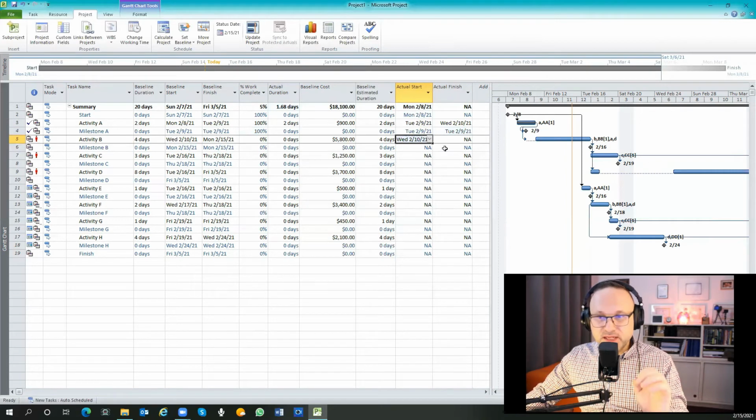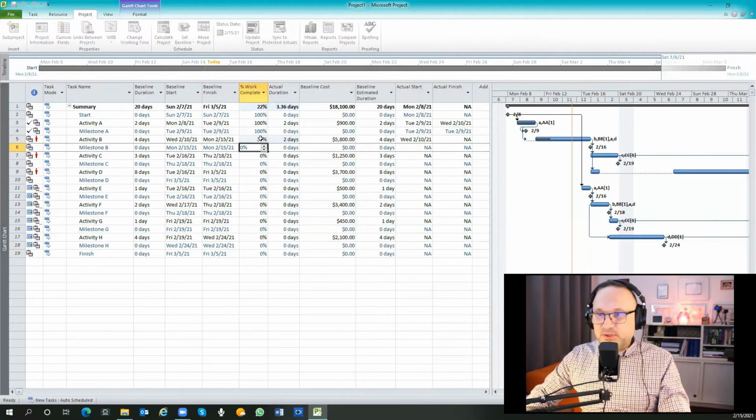10th of February, the activity has started, and work has been completed up to today. It's 80%. So you can see that I'm exceeding, actually, and I'm ahead of schedule because of today. But if I say that I am only 40% or 50%, you see that I am actually behind the schedule and I am already delayed.